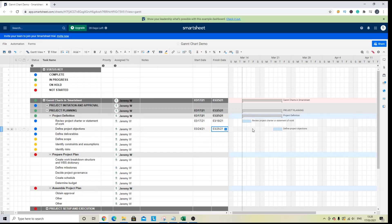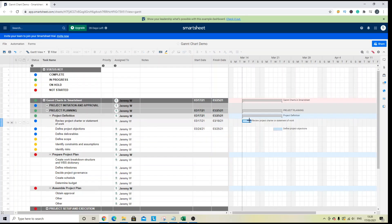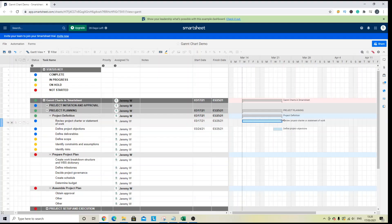So to do so, if you find your task or subtask in this instance, you can extend the length of the task within the Gantt view. And what you'll see is that changed the finish date of the task.